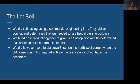There was a range of solutions. We worked with a commercial entity that did the first review, and then we came back with Pat Hines later on, and his review was much more favorable because I think he was more involved with residential and less nervous about making recommendations. At one point we were looking at helical piers, which could have been anywhere from $50,000 to $200,000 for a solution to put a slab on grade for a 1,000 square foot structure. It was pretty counterproductive to even think about finishing the build at that point. We were pretty discouraged. So when Pat came on board, our review was much more favorable, and he came up with good solutions that we all could work with.